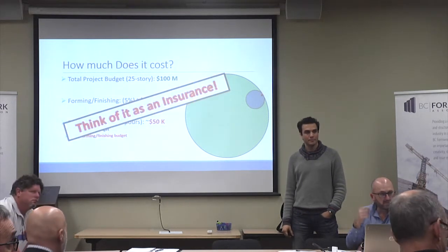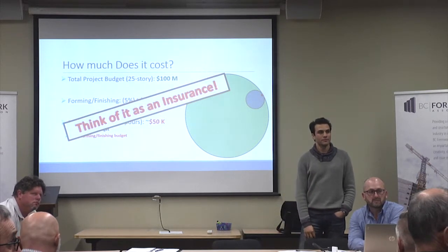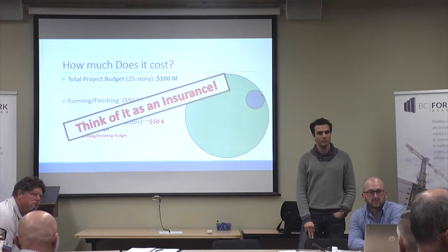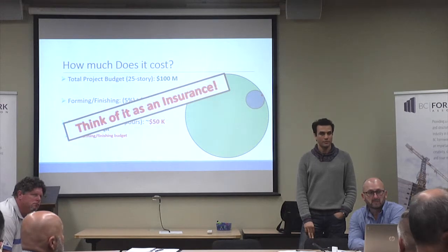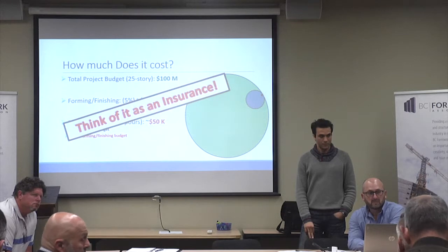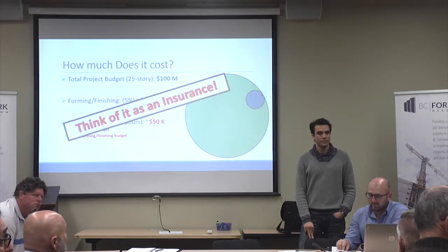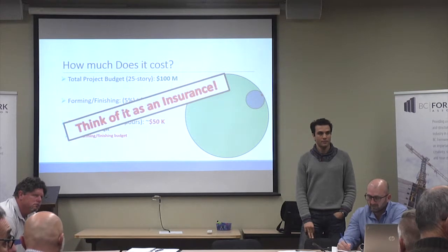So you had a number of 100 down to 80, and your percentage of finishing depended on that number that came out of your floor flatness. Because for us anyways, the guy comes and places the slab, you pay him, comes time to finish the floor, he's gone, he's not coming back to finish the floor. So that way, you did that, you gotta get the money out of him, or it was soon enough, he could come fix that floor right away, you hand that report to the general, you're done.